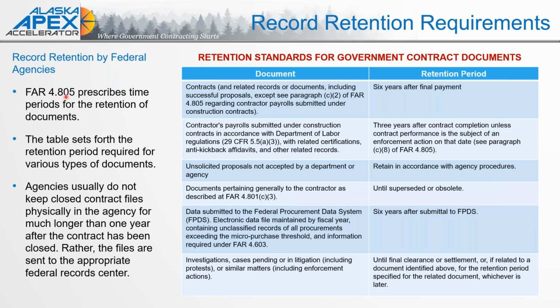FAR 4.805 prescribes time periods for the retention of documents, and the table here sets forth the retention period requirement for various types of document. The agencies do not need to keep closed contract files physically in the agency. So again, that also applies to you. You don't necessarily have to have it on your facility, but you need some sort of retention method where it is retrievable. So if you turn everything to digital material, have offsite storage for that digital media, or offsite storage for those physical hard copy documents.